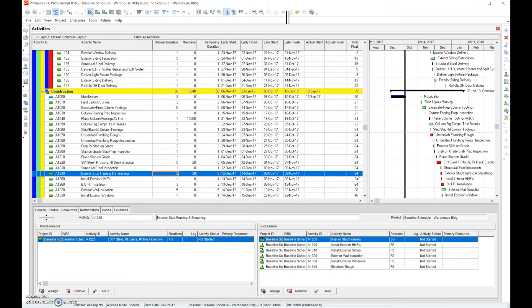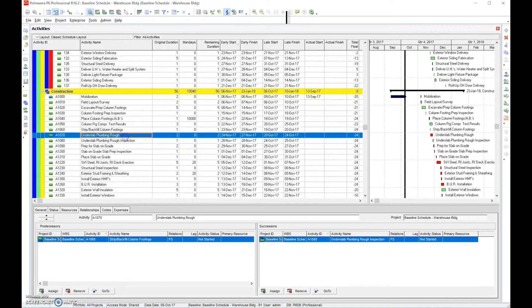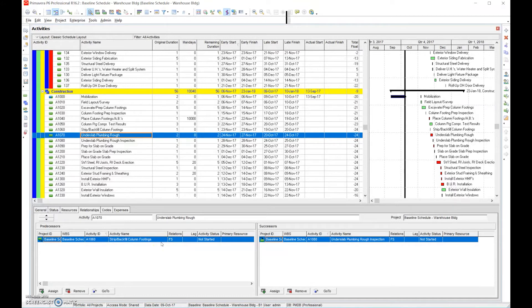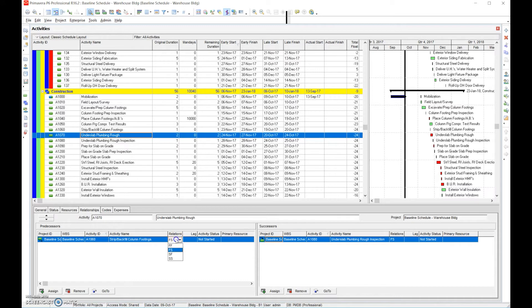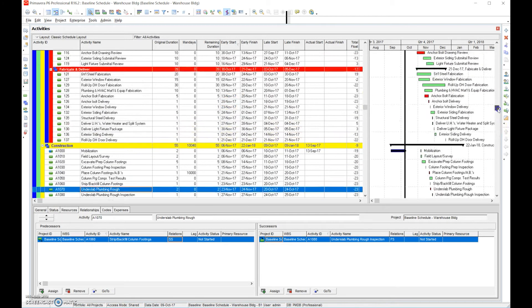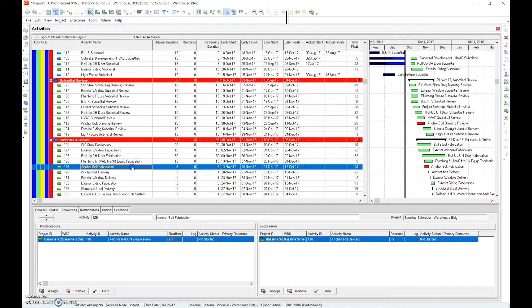So that's one way. The other way could be, let's go through here, under slab plumbing rough in. Now we have strip and backfill column footings. Now do we have to wait till the stripping backfill the column footings in order to start a rough in plumbing? Not necessarily. We could simply just say, okay, we'll do a start to start, meaning we can start at the same time. All right, so that reduced it by one day and we're going to continue to go through the schedule by changing relationships, adding additional resources.